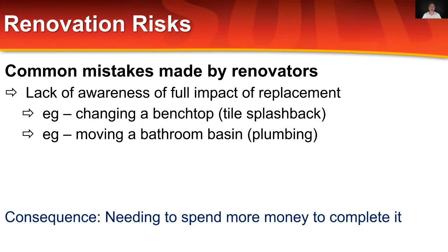And if you take the bath out and you crack a tile that was made in the 1920s, the odds are you're not going to find many tiles from the 1920s to replace the individual tile that you broke, and you might need to then replace a whole pile of tiles. So it's a consideration of the impact of what you're trying to achieve.